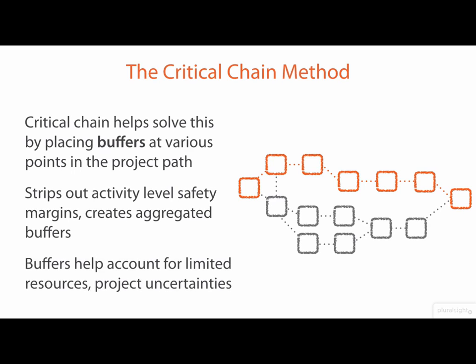Buffers help to account for limited resources so that when we do need to wait for those resources to come back available to work on the next activity, we have a way to account for that extra time. However, buffers are also better at dealing with project uncertainties than simply building in contingencies at the activity level could be. After all, at the activity level, we simply throw away any additional time that we might have built in if we don't need it. Or we might even have ourselves convinced, based on the way that we've developed our schedule, that work simply can't begin on the next step until a certain amount of time has passed, when in fact, because everything has gone according to plan, and in fact better than plan, we could have gone ahead and moved on to the next activity more quickly.